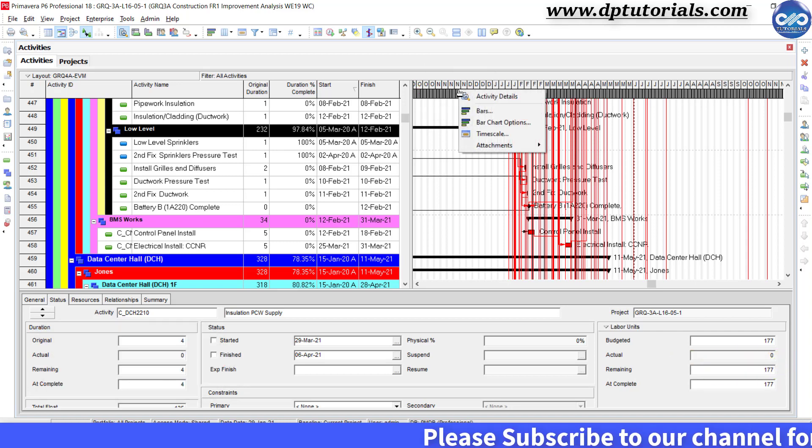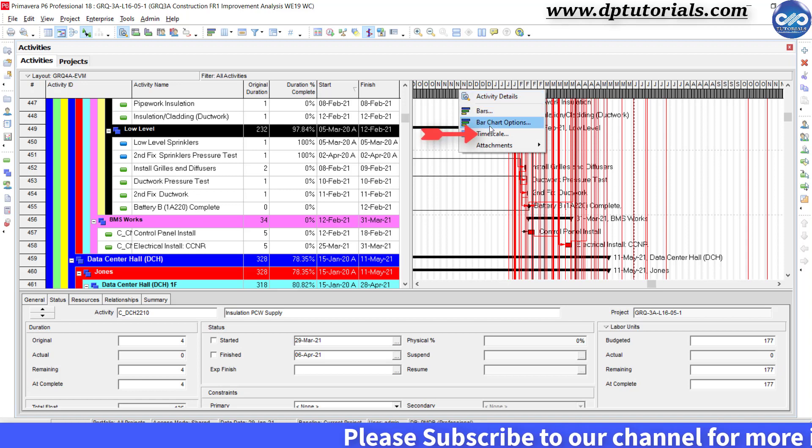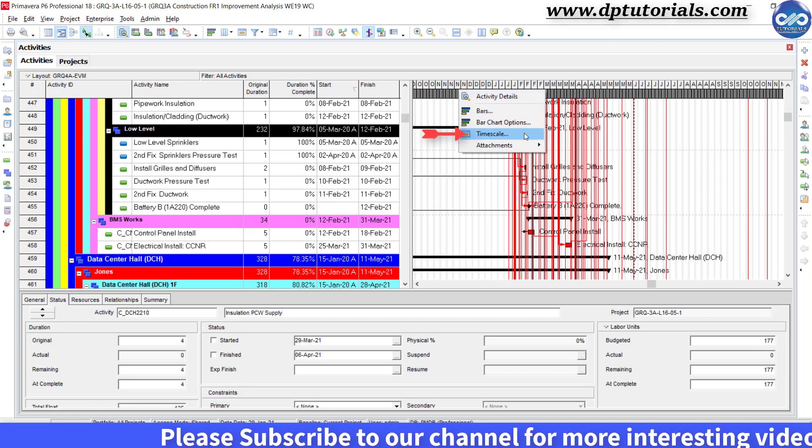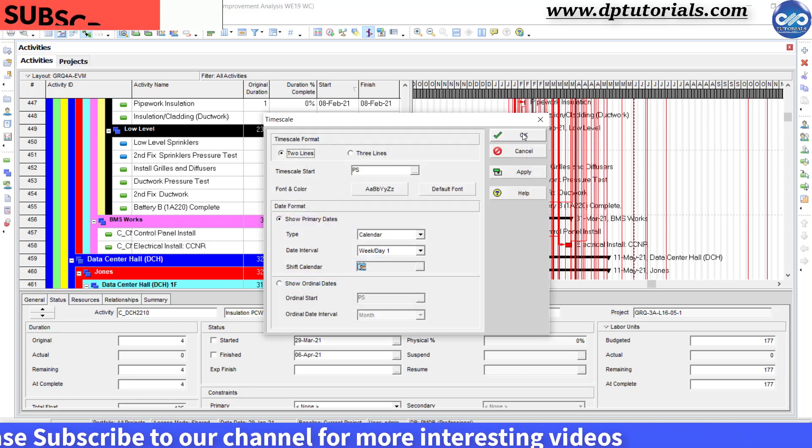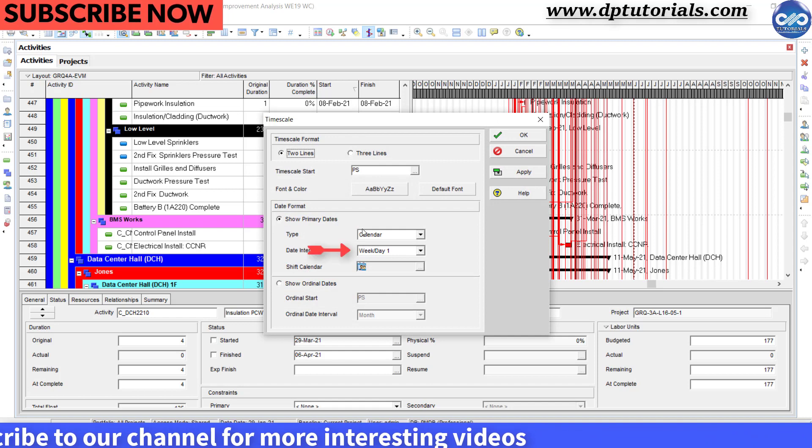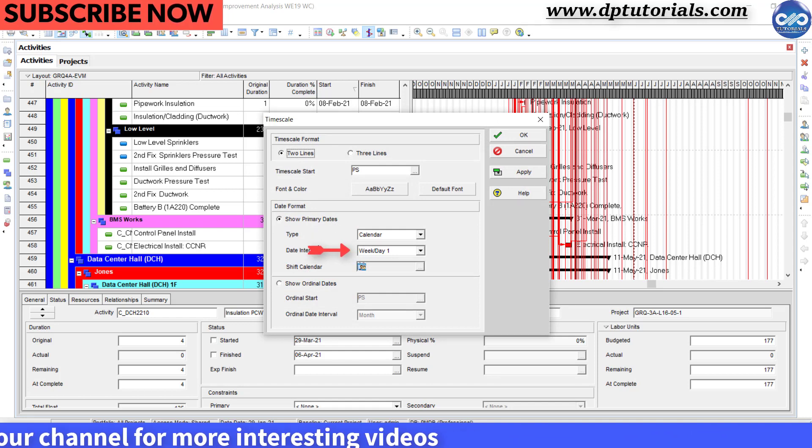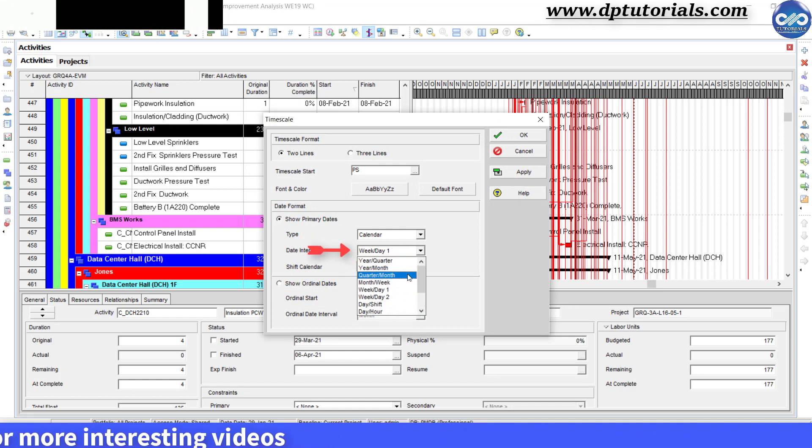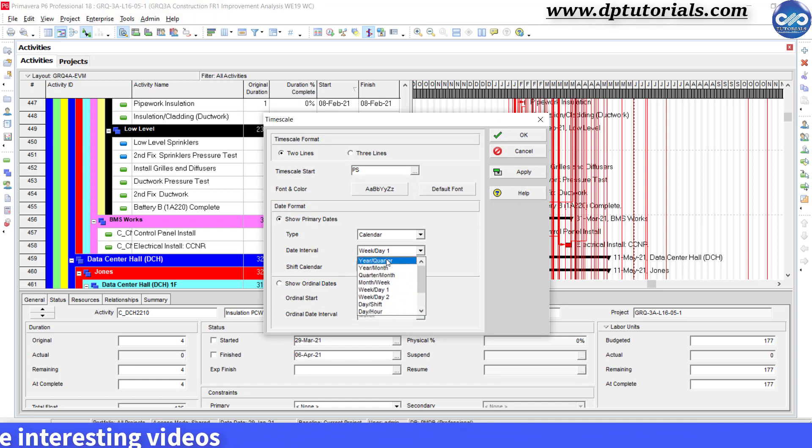Right click on the Gantt chart and click on time scale. In the time scale dialog, change the date interval to year and quarter. Click ok.